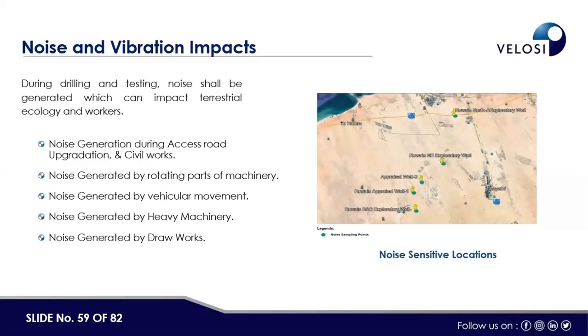Basically, we have to see the project activities. We should have the complete construction activities from the client side, and then their organizational structure for that particular project, so that we can develop the environmental management system or the framework, and then accordingly, the outcome of the previous EIA.